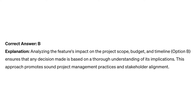Correct answer: B. Analyzing the feature's impact on the project's scope, budget, and timeline ensures that any decision made is based on a thorough understanding of its implications. This approach promotes sound project management practices and stakeholder alignment.